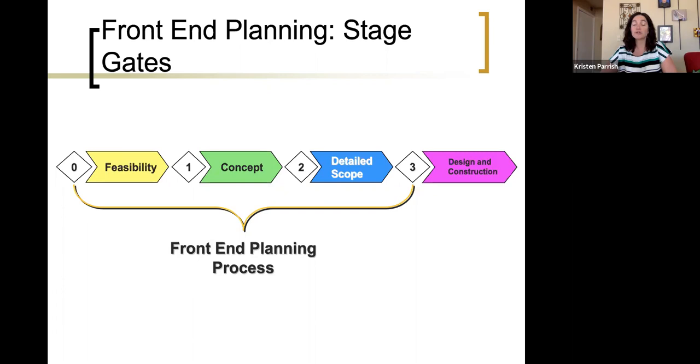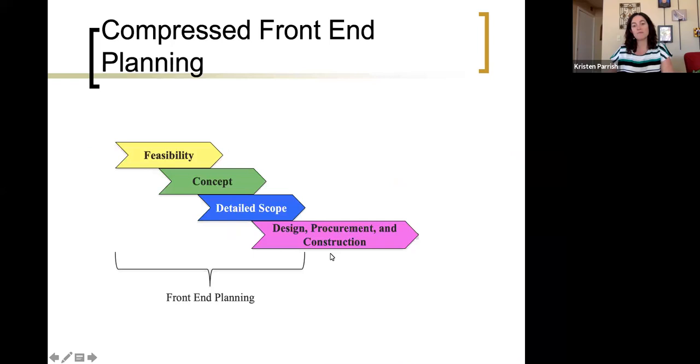So front-end planning was originally conceptualized as part of a gated process. So you go from feasibility studies through a stage gate into concept through another stage gate into detailed scoping through a final stage gate, and then into design and construction.